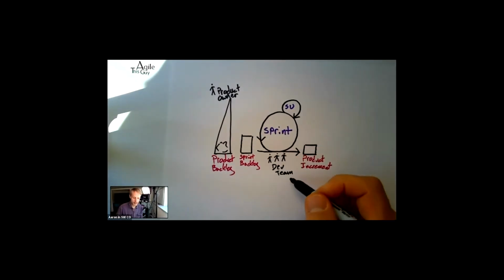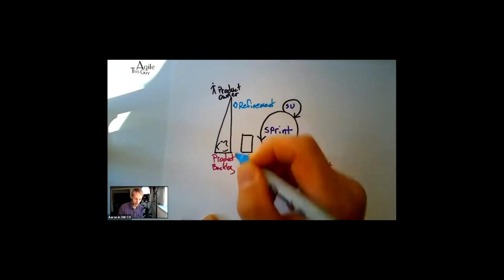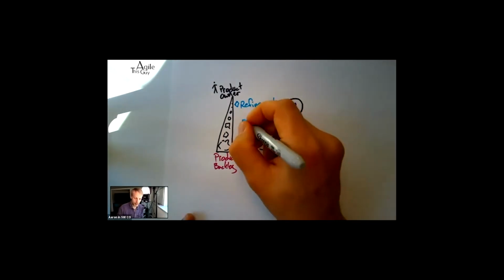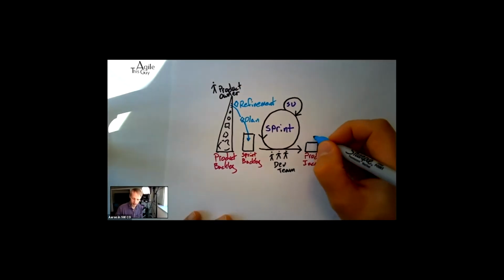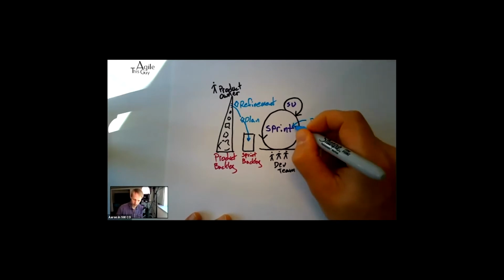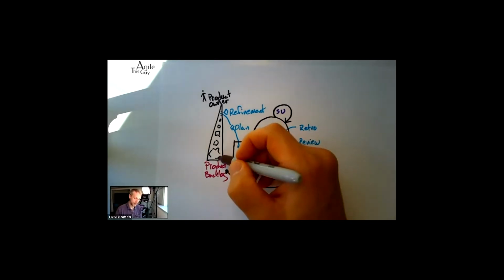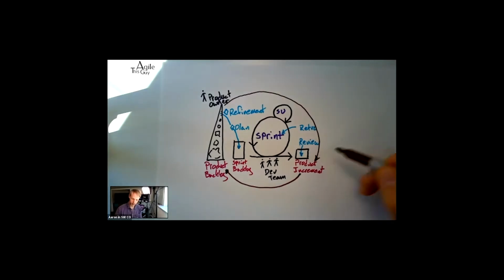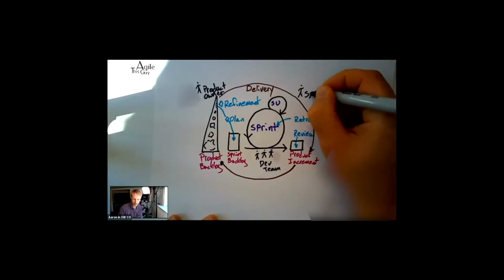So the dev team will get together with the product owner and do some refinement on those big items, make them smaller, better defined, top of that product backlog, which should make planning go a little better, where we take things off the top that populate that list. At the end of it, we have our review of this product increment and then a retro on the sprint itself. There's feedback from the product increment that tends to have an impact on the product backlog, and the product backlog has influence over the product increment that we're doing. And this is all the delivery track, with the Scrum Master keeping things on the rails.